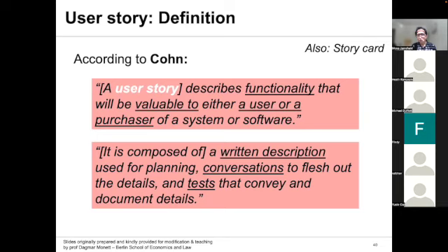Another thing that they say is an advantage of user stories is that they are quite easy for planning. I've touched upon it again. User stories are written so that each can be given an estimate. So when you write a user story, your developer is going to get an estimate of how difficult or how time consuming it will be to develop, right? Use cases, on the other hand, are generally too large to be given useful estimates.